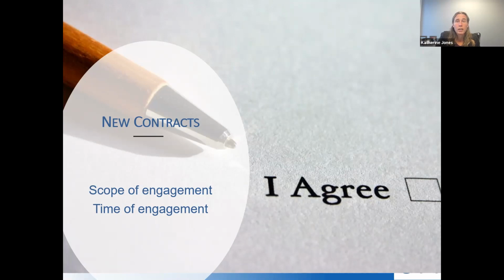And so in that situation, I would submit that you likely have now just engaged in a new contract. And so you had the original scope of your engagement, which was to design your water drainage system. But then you have a new engagement when the client calls years later and asks another specific question, which is, is this system adequate for the emerging climate? And so that answer then can create an entire new engagement, an entire new contract, which can then lead to an expanded scope of your engagement.